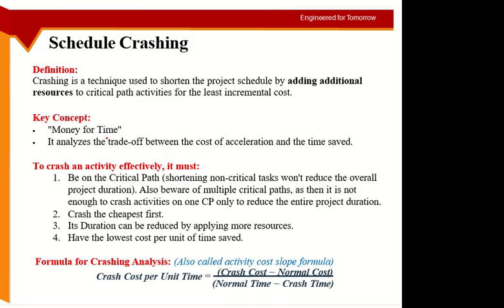And going back to the question which I raised at the start of the lecture, we are not talking about scope and quality. Because if you include that, then you can compress any activity which you want if it is on the critical path. I wanted 10 ACs. Okay, I'll reduce it to 8 ACs. Now it is possible to compress this activity as well, and even without extra resources. So we are just talking about reducing the time and looking at the effect on cost. So scope and quality is not included here.